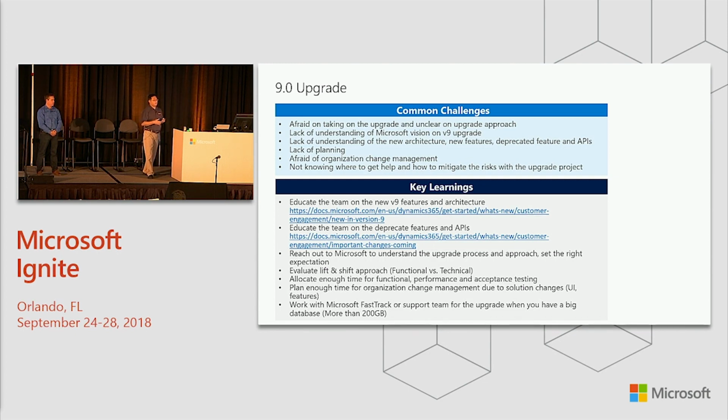But at the end of the day, what we're doing here is, if you don't have enough time to convert to the unified client, you can still do the platform upgrade. From 8.2, you can upgrade your platform to 9.0. And then all the customization and configuration that you have in your 8.2, if you actually follow the supported mechanism, it will still work. Because the recommendation here is you can copy your production database and make it a sandbox copy, and upgrade it to 9.0.